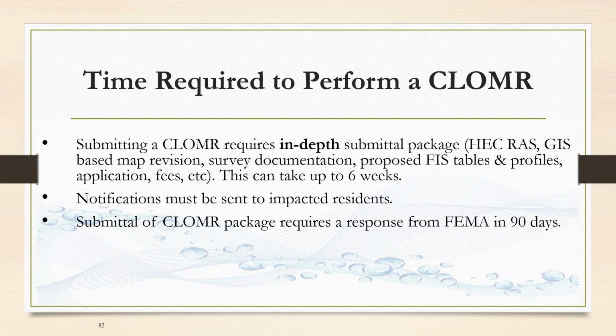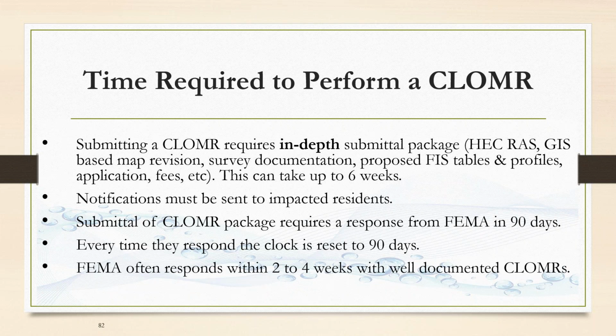And then the submittal of the CLOMAR package requires a response from FEMA within 90 days. So let's say that we've got 6 weeks into this, we've submitted it. Now FEMA has 90 days to respond to us, and we sit back and wait. Every time they have a question about this package, say, for some reason you didn't include your survey documentation, could you please submit that? The clock resets to 90 days. So it's very important that when we submit a package, it is complete if you want this to get out in a timely fashion.